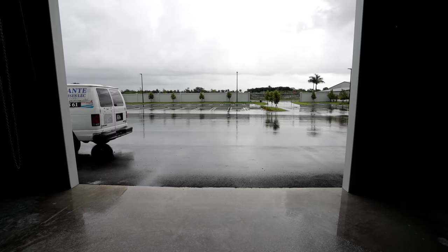Here, what's gonna happen in this caged off area? So this caged area here is our parts room. This is essentially about 10 times bigger than our current parts room. So as we've all seen in the last 3 years, parts availability, whether it's pumps or lights or motors or steering or whatever imaginary part comes up in future builds, it's been hard to get. Our goal is to stock a year's worth of parts so that we can overcome the fluctuation of parts accessibility.